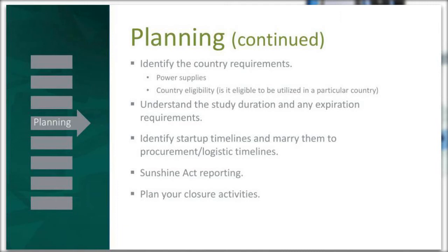Some people have interpreted that regulation to be report everything associated with what's distributed to a site, everything from disposables to patient retention tools to higher expensed equipment. Others of our clients have interpreted the Sunshine Act report to be much less strict, so only a few things get reported. But understanding what your requirement is during the planning phase will really help you to stay compliant with reporting your supplies throughout the duration of your clinical trial.